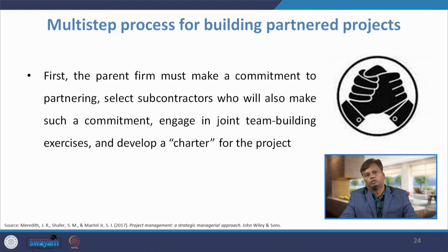Now, we will discuss the multi-step process for building partnered projects. So, how to have a partnership, otherwise how to do a partnered project. First, the parent firm must make a commitment to partnering, select subcontractors who will also make such a commitment, engage in a joint team building exercise and develop a charter of the project.